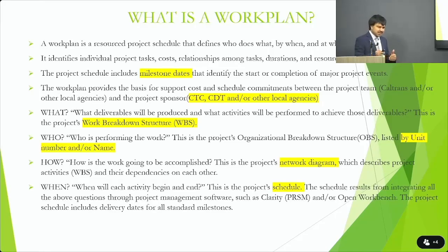Why not scope? Scope, that is something that progresses along as you work on the project. You might add some elements to your scope. Sometimes you might delete some elements from the scope. One example I could think of is, if you have 50 ADA curb ramps on a project at the beginning of the project. As you're working through the project, you would find 10 ADA ramps that require right-of-way, and then you're not sure whether you're going to get it or not. At that point, as a PM, you have two options: whether to delete the scope, which is those 10 problematic ADA curb ramps, or you can keep them and then try to pursue acquiring the right-of-way for those 10 ADA curb ramps. So those are some of the elements as you make progress on your project. As a PM, you make those decisions.